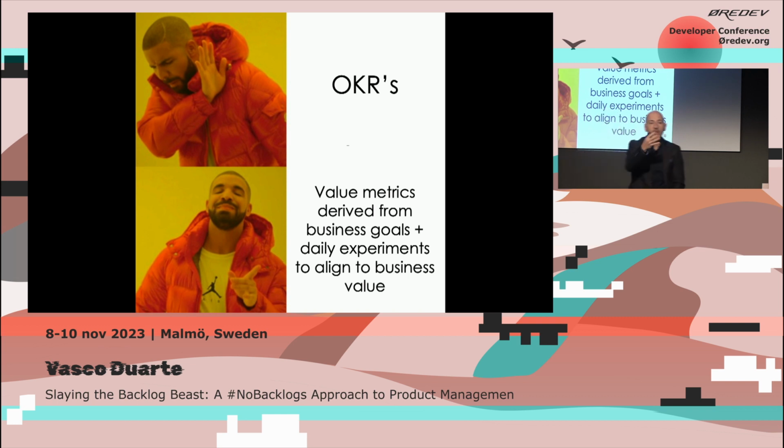But we were constantly measuring the features. And we even had a kill criterion. We had in the requirements, i.e. the specification, the vision that the product owner gave us, we had a line. If this feature does not deliver this many euros in revenue, we will remove it from the product. This is what we are talking about. This is what agile software development is all about.